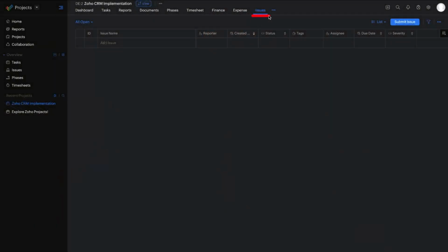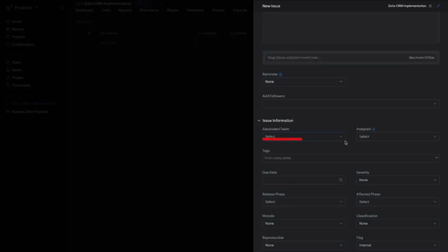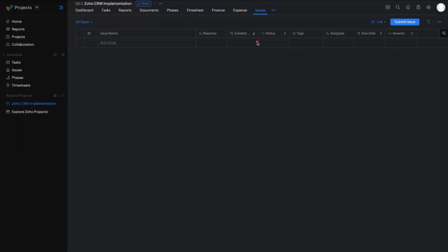But then sometimes you have things like product development. If you're developing an application, you don't know every single feature you're going to develop in the next 2 months because the product manager is making those decisions. So then they enter a queue, you put them in a sprint, you lock the sprint for a week and you go through it. And that's agile methodology. So the reason I bring that up, if you're on a development team, sometimes you want to bring up issues as they happen, and you can submit an issue here. You can create the issue, associate it to a team, assign it to somebody, and they can come up there. So you can also add issues. You don't need to use issues, but that's something that you can create there as well.